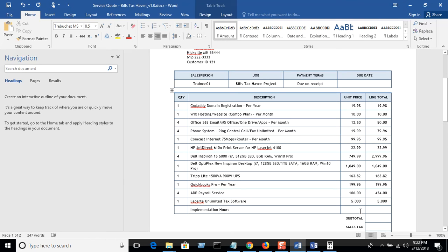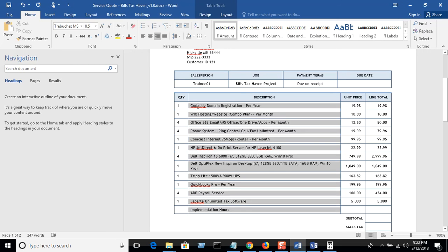Okay, so now I'm gonna go and kind of calculate, because this is an estimate also, so remember, it doesn't have to be 100% perfect, it's more of an estimate, and I'm gonna add some more time to it just to buy myself some wiggle room, just in case some of my estimates don't turn out to be exactly what I think they are. So to register, I'm just gonna add an hour there, so I'm gonna put this into a spreadsheet real quick.